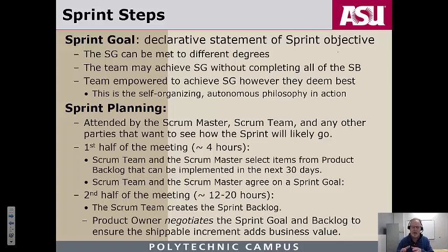In other words, they're focused on the tasks that were defined in the sprint and not the requirements, not what was supposed to go in the software. The sprint goal should be phrased in terms of what software is to be delivered in the potentially shippable increment due at the end of the sprint, not defined in terms of what work the team is going to do.